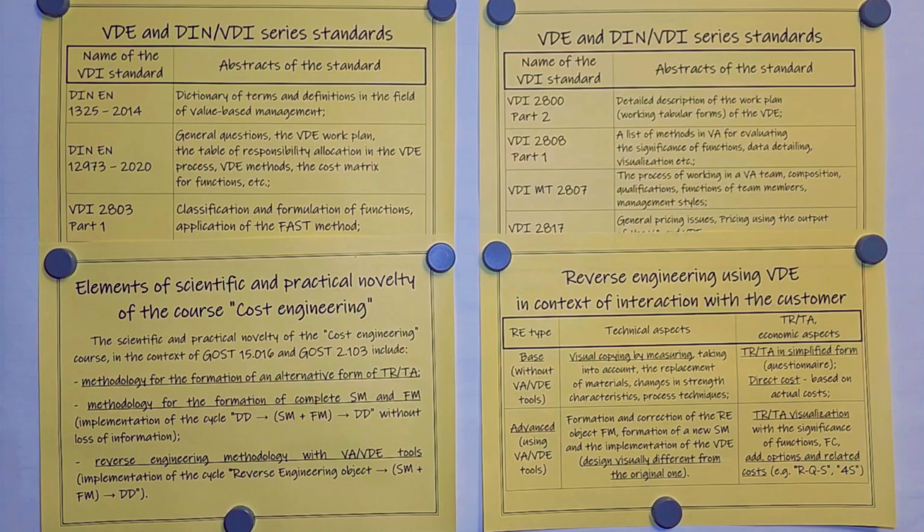In the case of extended reverse engineering, the use of value analysis is used less often due to the occurrence of additional costs for attracting a cost engineer to the project team. However, the minimum expected reduction in direct costs, if applied, is in the range from 5 to 10%, which in most cases covers the costs associated with attracting a cost engineer.